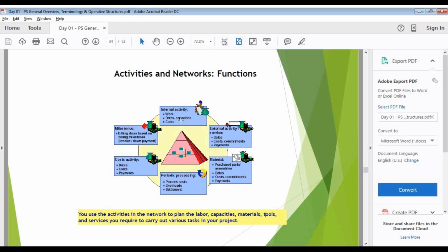That will give me planned cost, and the actual cost will come from the combination of the cost center of the employee and the work center I have used in my internal activity. The work center will have its own activity type, and the cost center of the employees. For this combination, I will maintain some cost in KP26 for a particular period. Again, if the cost is not maintained, the system will not throw an error, but the confirmation will not happen. It will go and sit in some table. I will give the table again. From there, you can see that this confirmation has not been done. I have to maintain the activity type, activity cost here in KP26.